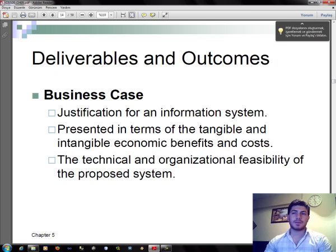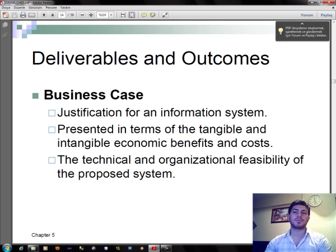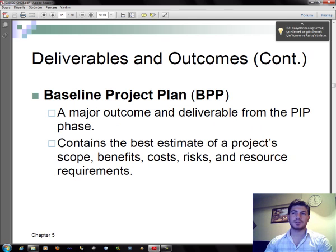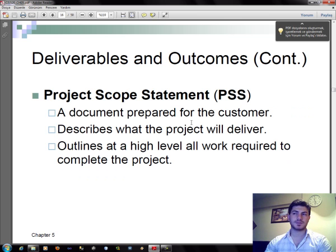In our business case, it is necessary information — a justification for an information system — presented in terms of the tangible and intangible economic benefits and costs, and the technical and organizational feasibility of the proposed system. The important part is the baseline project plan: a major outcome and deliverable from the PIP phase that contains the best estimate of a project's scope, benefits, costs, risks, and resource requirements. A project scope statement is a document prepared for the customer that describes what the project will deliver, outlined at a high level of all work required to complete the project.